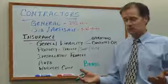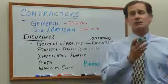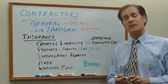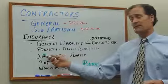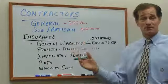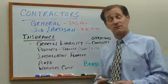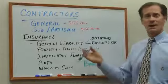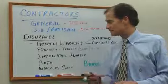Next is an installation floater. An installation floater is for that load of wood, that load of copper, whatever is going into a site that you haven't billed the client for yet. You still own it, and if something goes wrong while you are installing — if it all disappears in a fire or something like that — you can assign a specific valuation to an installation floater. These are job-specific, and if you have any questions about whether you want to insure something like that, just give us a ring.